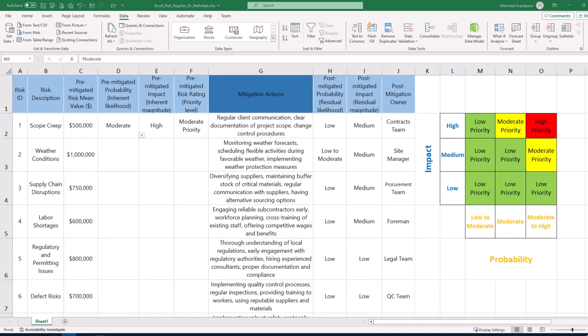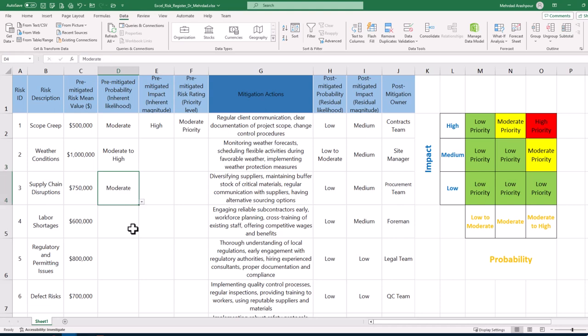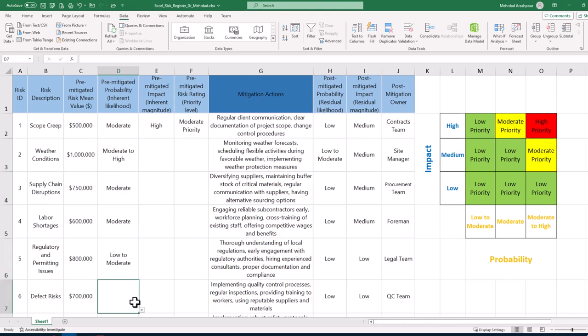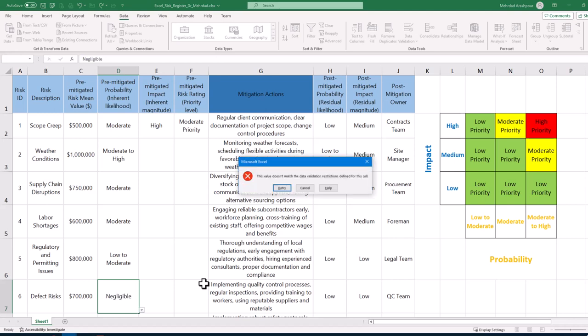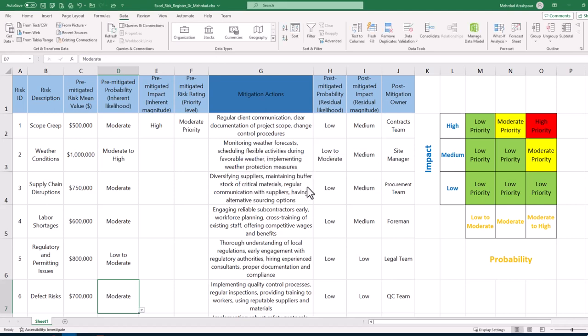As you can see each cell now has a drop down menu from which likelihood levels based on our heat map can be selected. If we try to violate the validation criteria by typing a value out of the predefined list, an error message will appear. We follow the same procedure for pre-mitigated impact or inherent risk consequences.